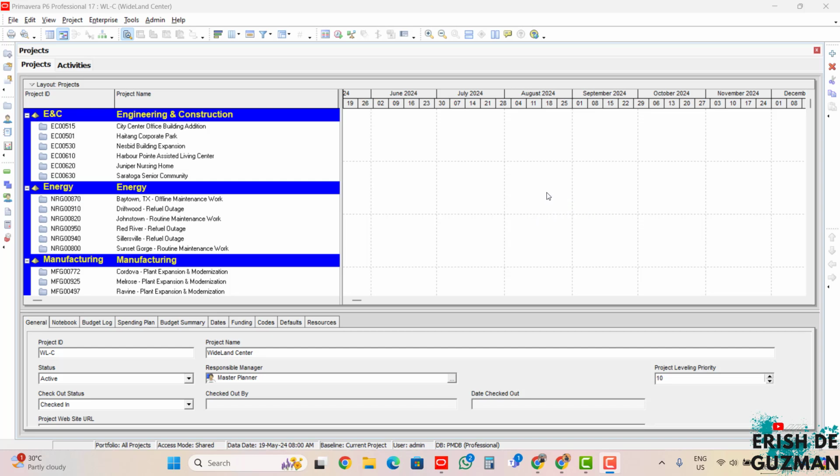The second type of Primavera file is what we call the PLF. This is used to exchange layouts between Primavera databases regardless of the database type or database version in which it was created. Third, we have what we call the ANP. The function of this file format is to save the position of the activities in an activity network. Next, we have the ERP. The function of ERP is to exchange reports between the databases inside Primavera, and again, regardless of the type of the database in which these reports have been created.